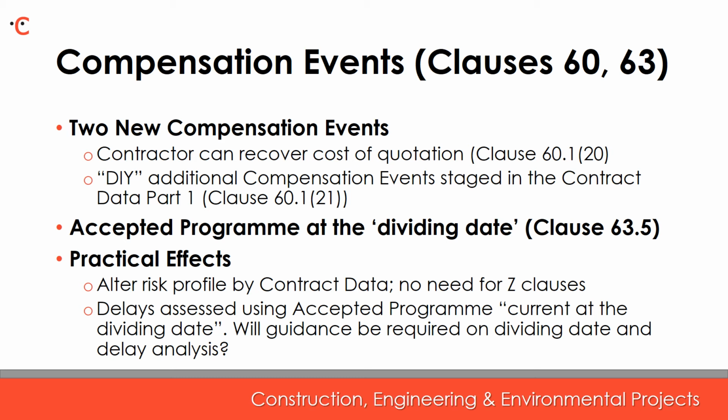It is also stated that the delay should be assessed by reference to the accepted programme current at the dividing date. Assessing delay is often a complex process, and the dividing date principle, although directed at trying to provide clarity, could cause issues which may need guidance and/or expert input. For example, what if a contractor takes 8 weeks to notify a compensation event, and in the meantime there has been more than one accepted programme, which itself shows the effect of that compensation event?